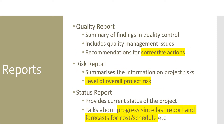The first type of report is a quality report, which talks about the summary of findings in quality control. There are two kinds: quality assurance, which talks more about processes and precision, and quality control, which talks about findings, testing, number of defects, and test cases executed. The quality report may also include recommendations for corrective actions in terms of product, process, and project performance.